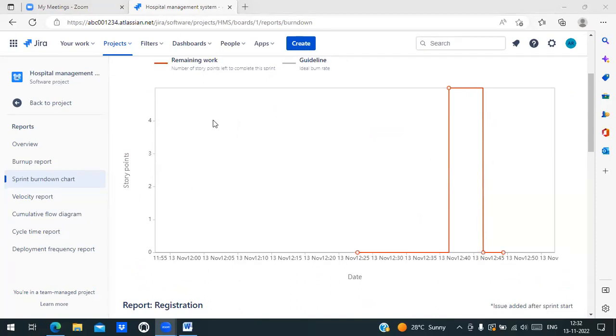See here, Raghav, I have put the story points. If you pull all the story points and you're unable to complete them, the graph will be somewhere at 3, because you have not completed the total story points. Let's assume 10. But why is it 3? Because we have only completed 3 story points' worth of user stories. It will be somewhere in the middle. Yes, got it. Thank you. Welcome.